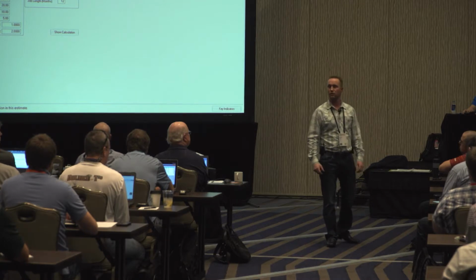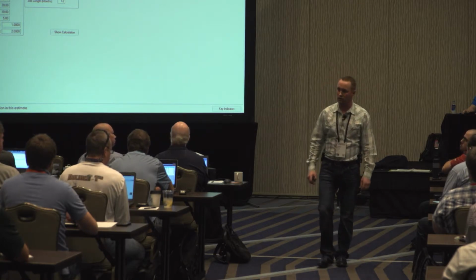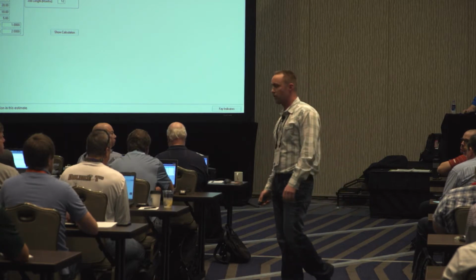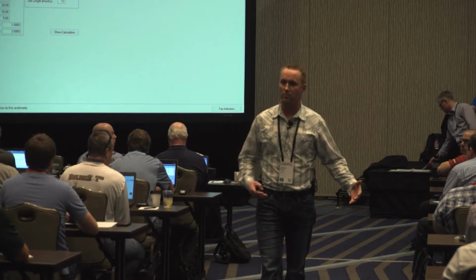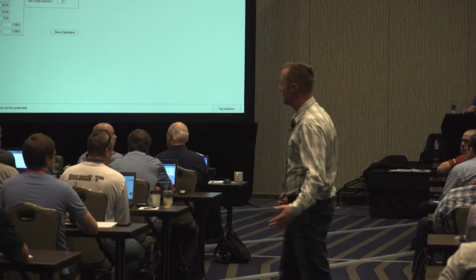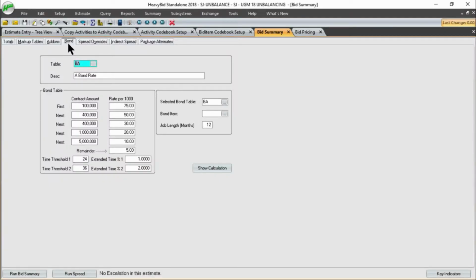Anything over a year, we do a schedule on and then reference back into a cash flow chart, because our company's all about assets. We have the largest fleet in New Jersey. It's worth over $100 million. But we don't have a lot of cash in the bank, but we own most of our equipment. So cash flow is very important to us, because if we go negative on cash flow, then we have to start selling off equipment.